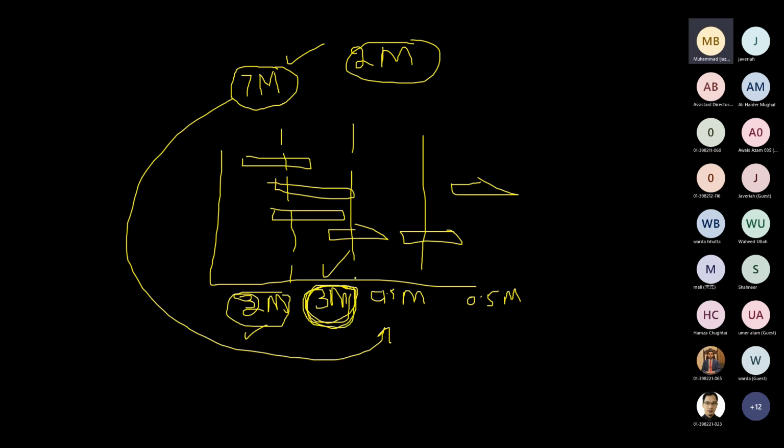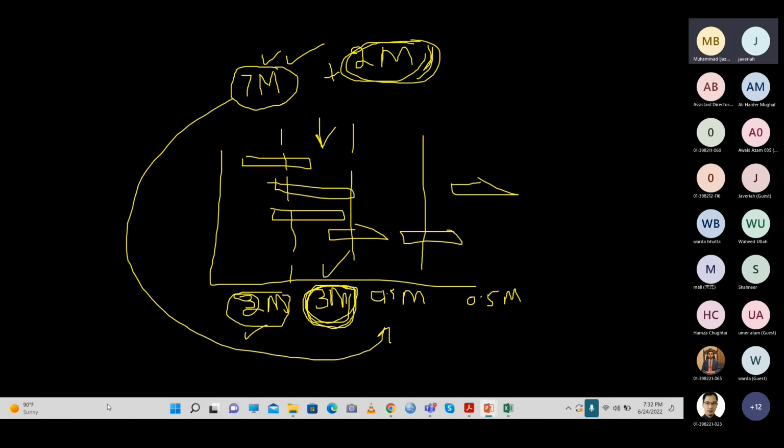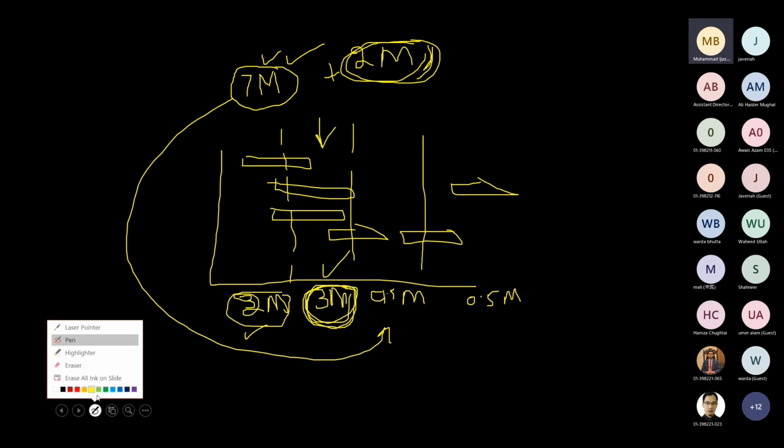In charter, they mentioned that your project has to be completed in 7 million, and for any given month, funding requirement should not be more than 2 million. So plan your project accordingly. In this particular case, our second month requires more than this limitation, correct? Yeah, correct. So what would happen as a result?